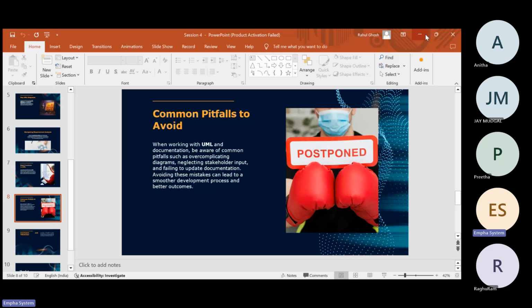Okay. The next one is FRD. What is a functional requirement document? Of course, we have to develop the FRD from the BRD. To be honest, this kind of documentation is called sequential documents. One by one, based on some documents, you have to develop the future documents. Yes, from the BRD, you have to maintain the FRD.